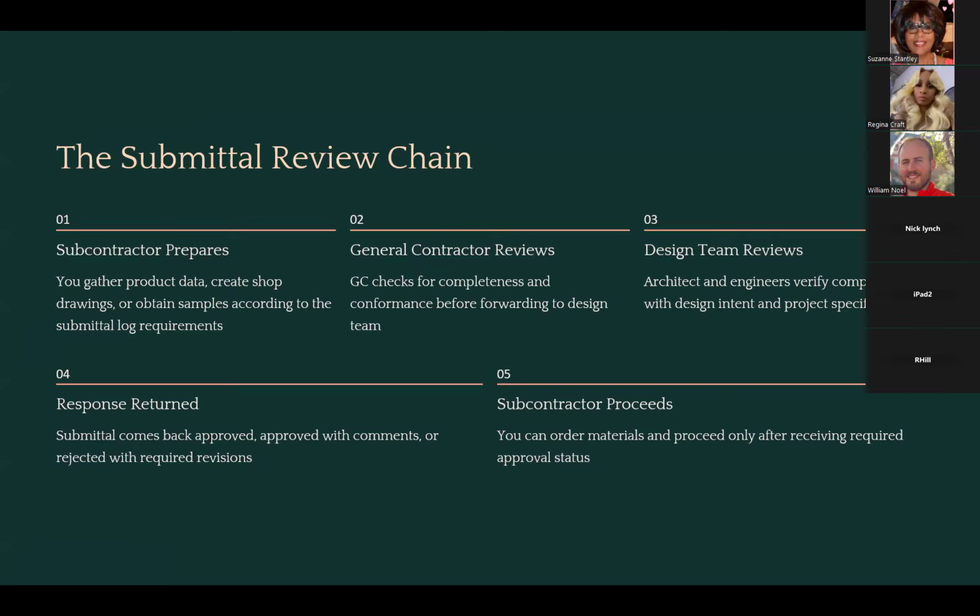So it may take you 18, 20 plus weeks from the time you sign a contract before you can even get that material. And you need to be thinking about that when you sign up for this, as to when you're supposed to have it on site. So in general, and I have a diagram on the next slide that'll show it in a little bit more detail.